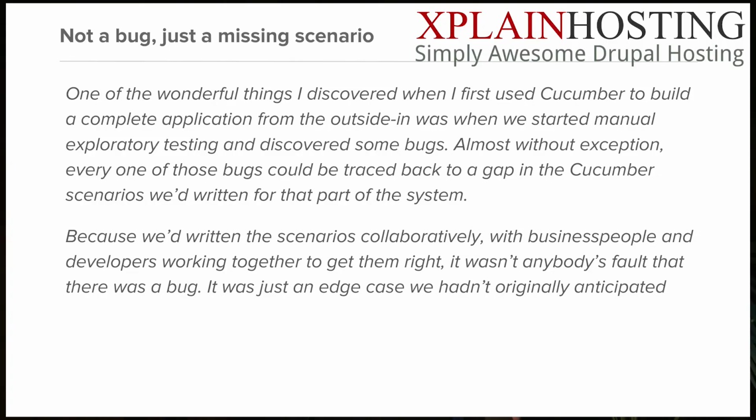So how do you do your new project? You write your scenarios, or your business analyst writes them. You implement all the steps as deferred, as we have seen before. Either let Behat generate the snippets, you have these throw pending definition in there. And then all your tests will run, but they will all say pending, pending, pending. And then you start implementing it. And when is the project done? When all steps pass. Easy. Very helpful for project managers. You know exactly where you are. We are 80% complete.